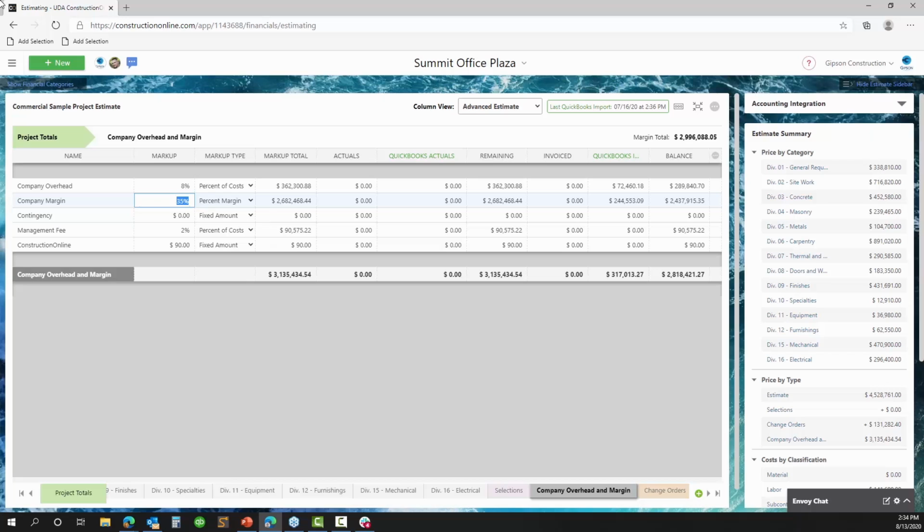Yeah, final word on this comes from someone in the audience actually who says, margin is the only way to stay in business. We agree. And in the majority of cases, absolutely 100%. Now, for those of you who are performing some type of cost plus fee estimate, the type of calculation that you're looking for actually is the percent of cost calculation. That's where you're going to expose the actual calculations. I found that that's typically where people are aiming when they're running that. But for the majority of clients that we work with, we found that the percent margin calculation is the most important setting to set in the template that you're working with, period, to make sure that the calculations are truly coming out in your favor.